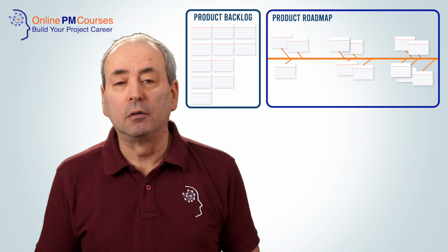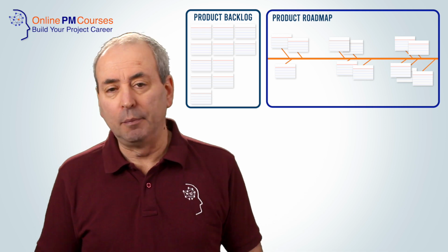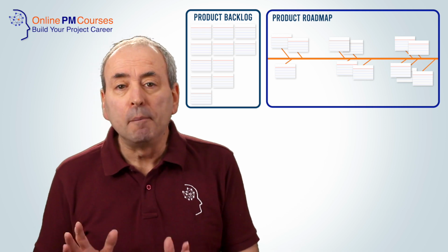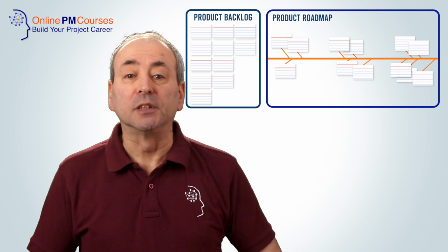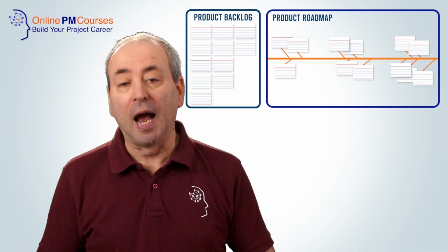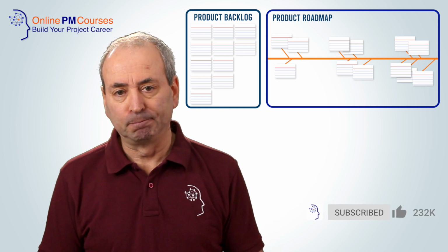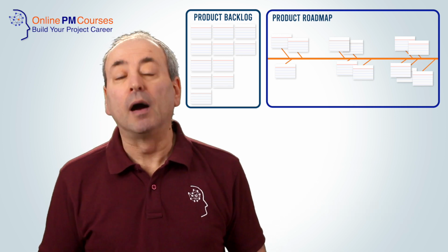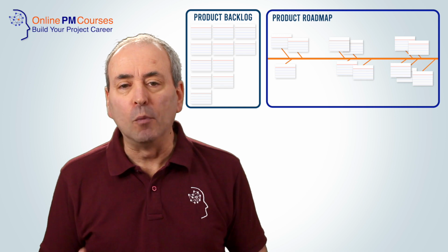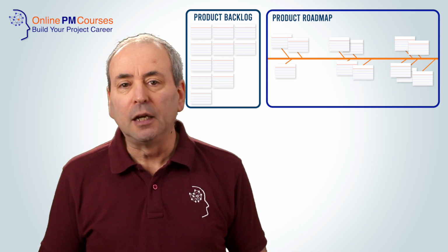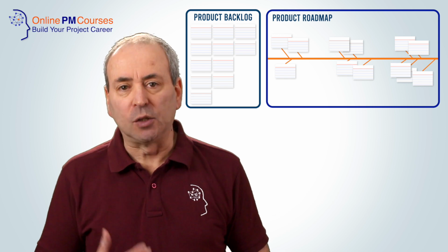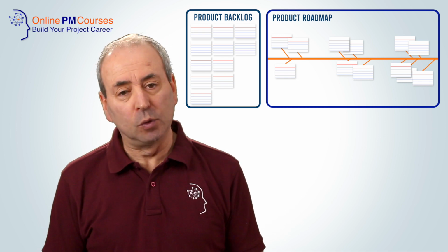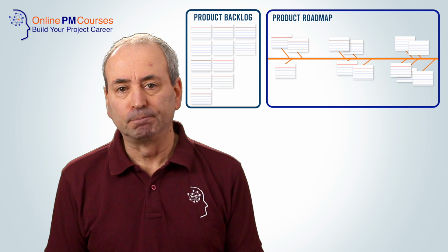As the backlog grows larger, it becomes increasingly important that product owners impose some order on it, perhaps labeling some items as near-term, medium-term, and long-term features. Near-term items on the backlog will have a lot more detail attached to them, including a full user story and possibly some substantial estimates of how much time it will take to develop the feature.